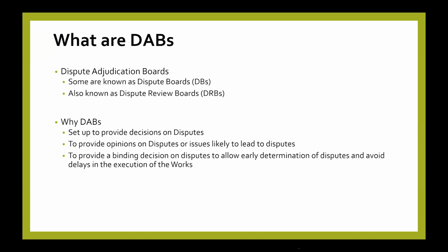And then we also found out that arbitration was a very long process, a very expensive process. And sometimes the earlier project contracts provided for arbitration at the end of the contract or the execution. So people waited, piled up all their claims, and at the end of the project, you are in arbitration for only God knows how long, to settle the disputes. And then the arbitrators sometimes don't know anything about the project, and some of the facts are lost in translation and everything.